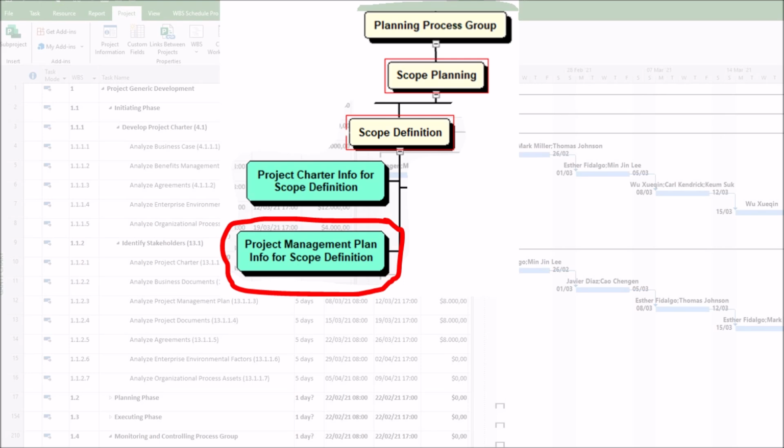As real-world consequences, we may have, first, project delays: frequent scope revisions due to poor initial definition. Second, budget overruns: unplanned work from unclear boundaries. Third, stakeholder dissatisfaction: deliverables don't match expectations. Fourth, project failure: if scope is unmanageable, the project may collapse.